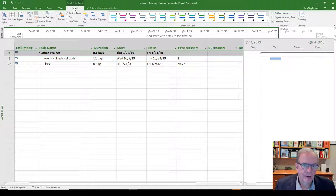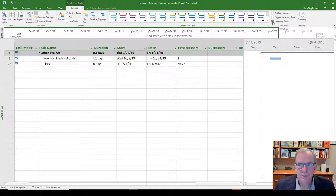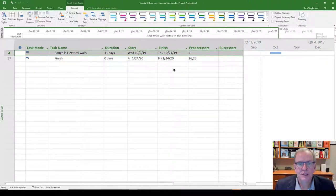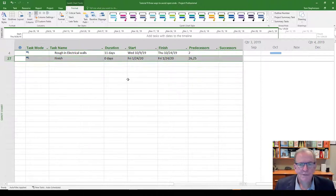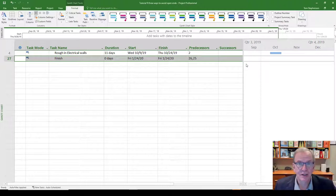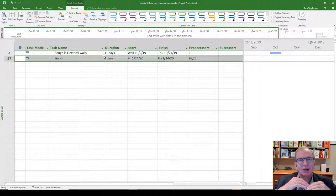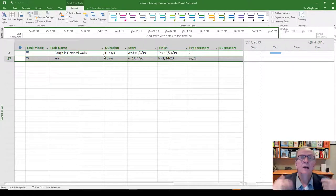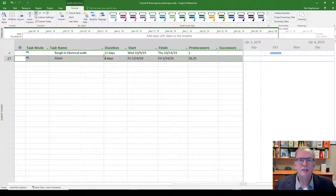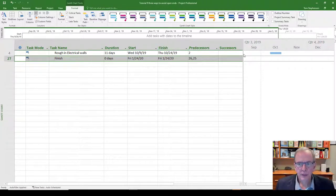If you have many summary tasks and don't want to see them, go to the Format tab and uncheck 'Summary Tasks' — now they disappear. With those hidden, I can see 'Rough In Electrical Walls' and 'Finish.' Finish is the last activity so it shouldn't have a successor. That narrows it down to one activity I need to fix. In a large project, this could narrow thousands of tasks down to just ten open ends to work on.